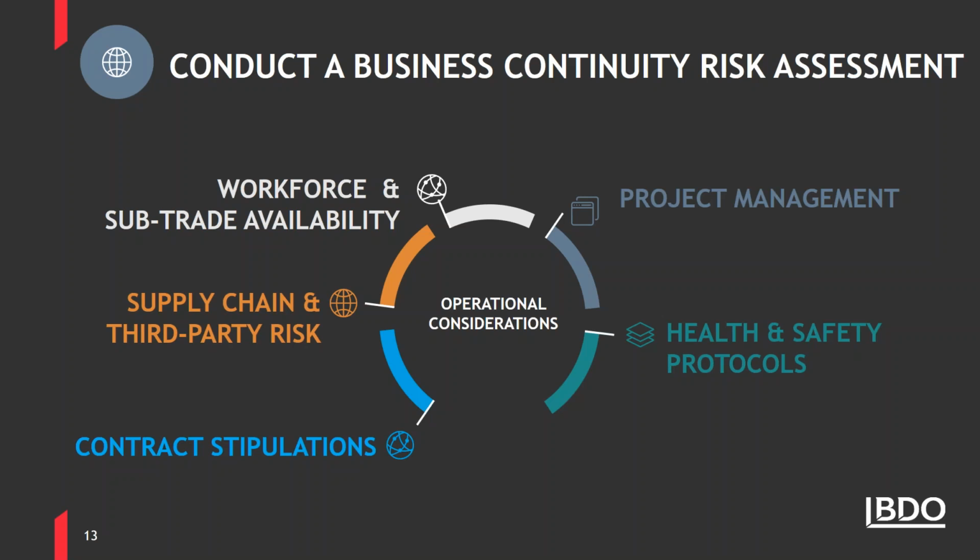From a project management perspective, it's important to consider reorganizing project workflows and scheduling to also mitigate delays of the critical path, allowing for early ordering and delivery of materials if the supply chain is at risk. This could also be about potentially storing more deliveries off-site if it's possible.